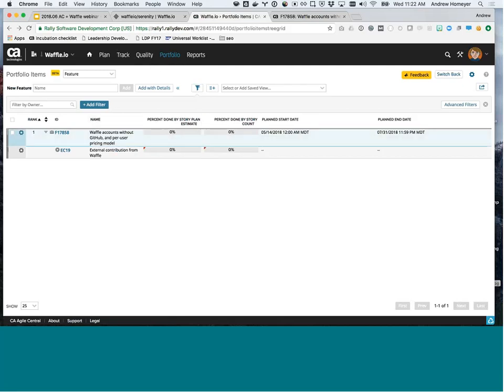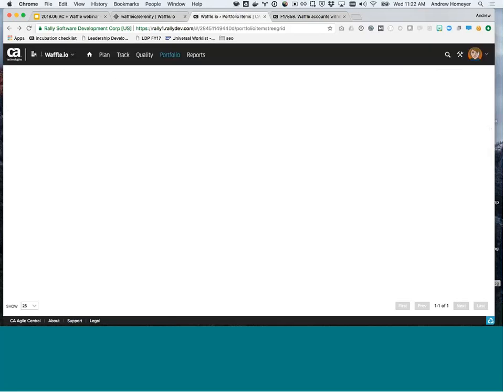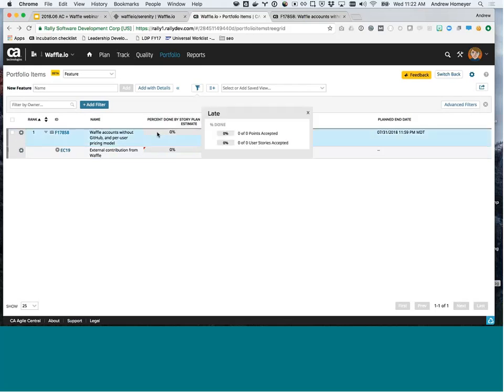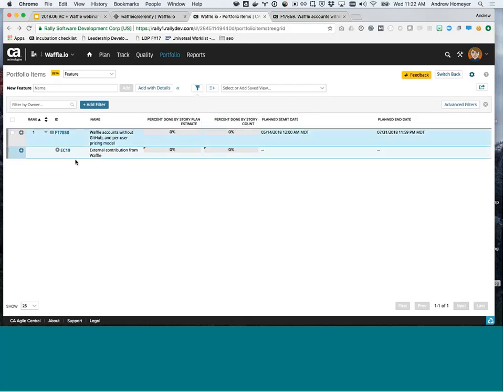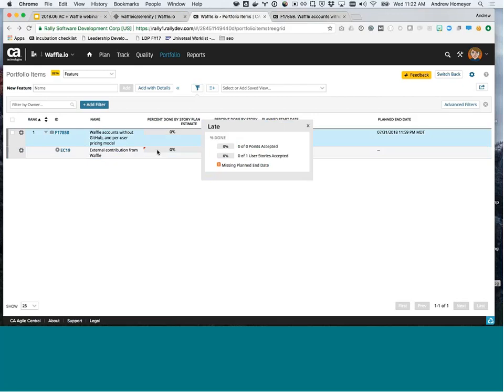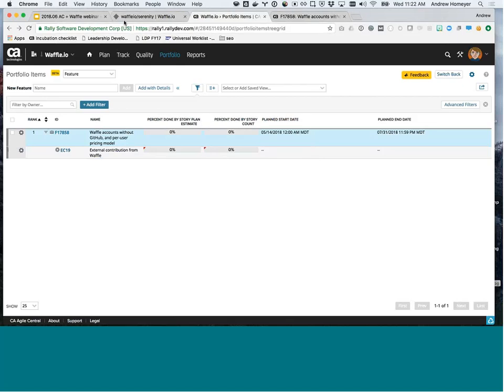We'll now see. Oops. Let's give it a second. Live demo. It's fun. Yeah. Cool. So we see that this new EC19 showed up. So extra contribution from Waffle. So any time you connect cards from Waffle up to Agile Central, you'll see this new thing pop up in this hierarchy. This is showing you that the work is being contributed up from Waffle. So this counts up all the different cards that are connected up to this feature and shows you what percent is done.